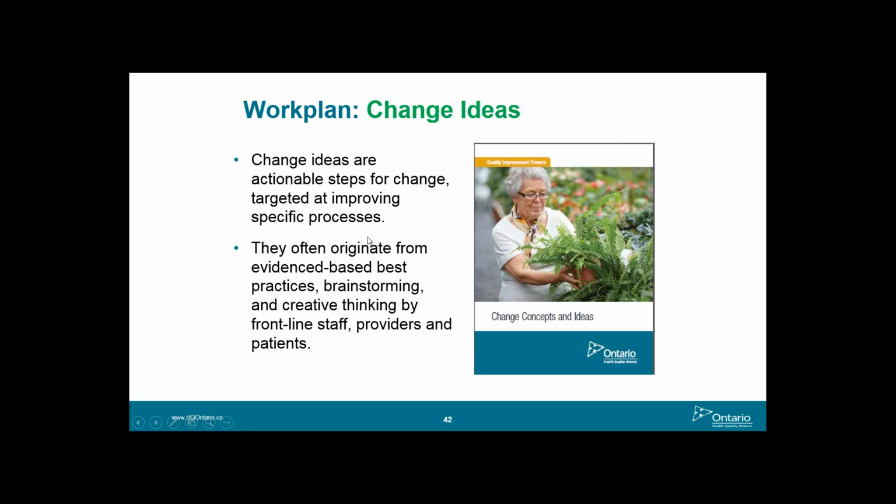So if you're talking about preventing falls, and you know that you're looking at, first of all, your antipsychotropic meds, you may want to say that this change initiative is dependent upon the information that we find out with the root causes with our medication review that we're doing.